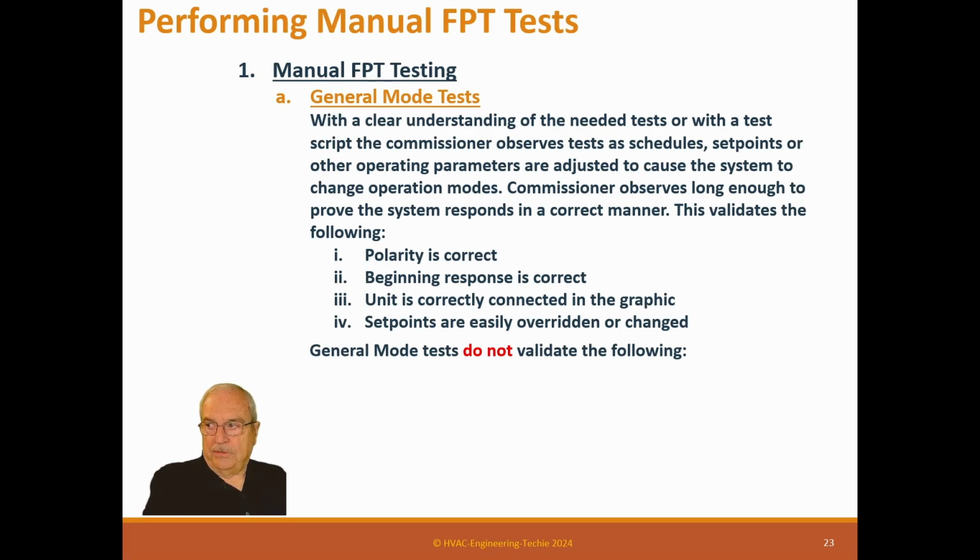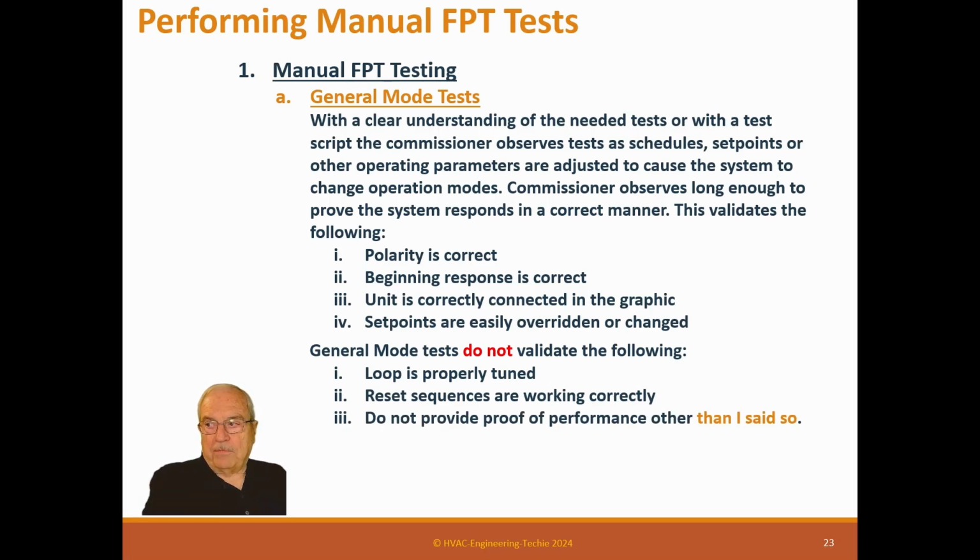General mode tests do not validate the following. The loop is properly tuned. Because you're manually observing it, you can't see a hysteresis. Reset sequences are working correctly. Do not provide proof of performance other than I said so.